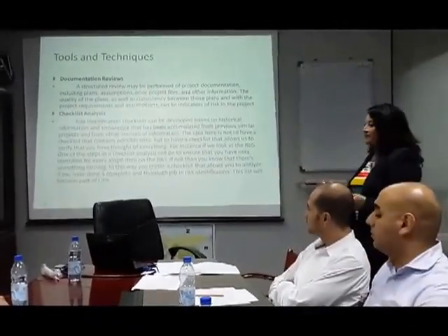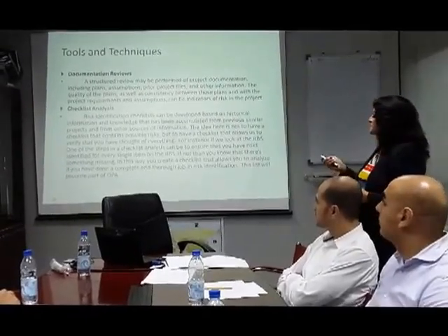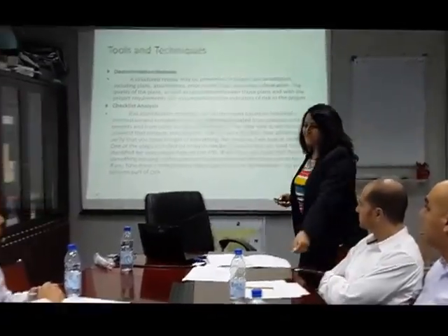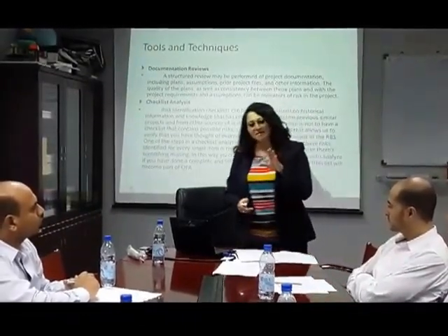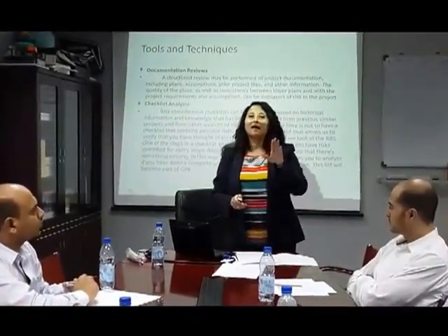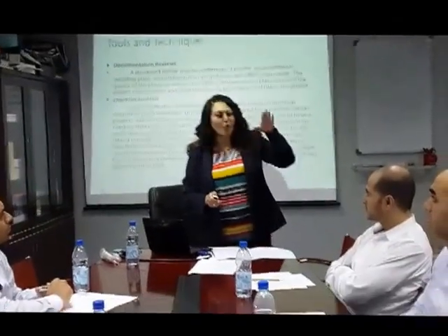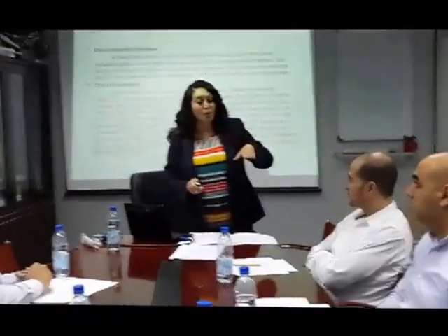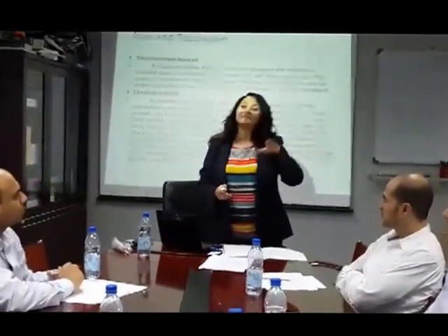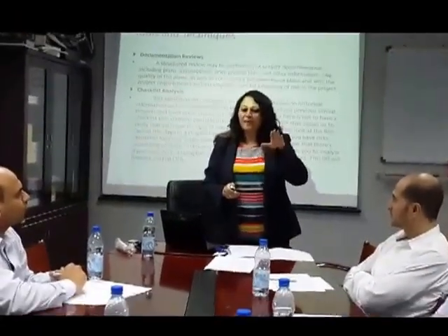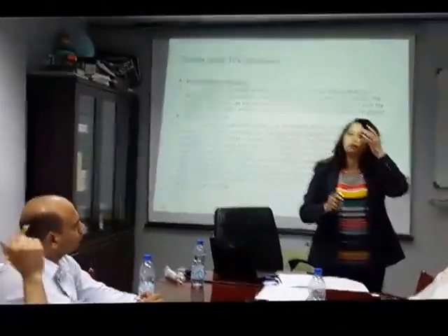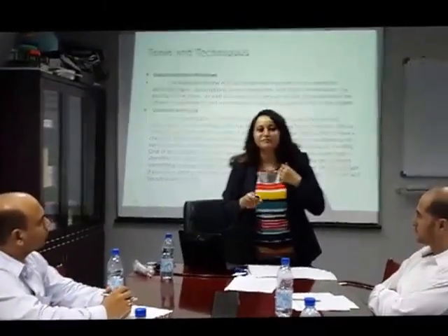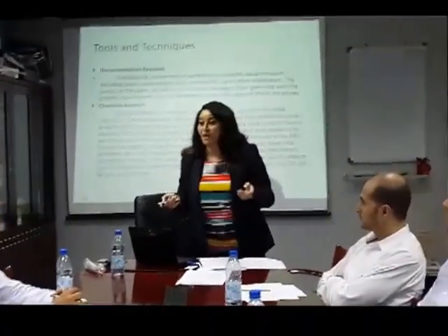Now, the second tool and technique is checklist analysis. What is a checklist analysis? A checklist is not what you think. It's not a list where I have all the risks written down. No. It's actually a list that makes me test whether I have thought about everything. Because when I want to look for risks, I have to really search for risks everywhere.